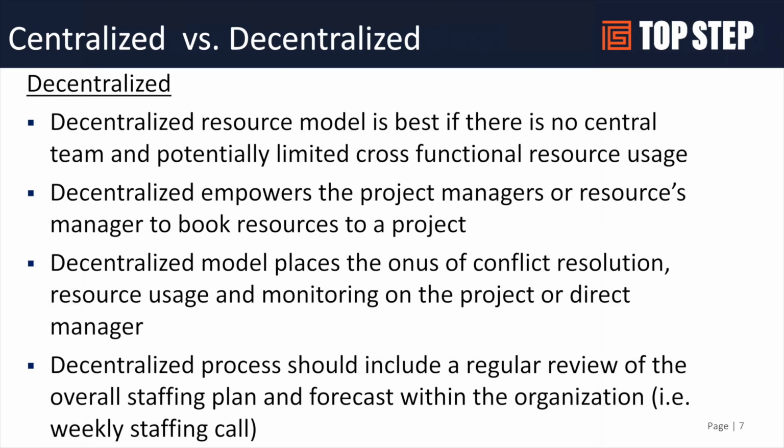As opposed to a decentralized staffing model, generally we see this in smaller organizations, but not necessarily. Basically, the folks responsible for the projects are also responsible for building out the project teams. A lot of times we see where the project managers are responsible for their own project staffing. So the project manager gets a project, they now have to go find staff available to them, and they're going and booking resources directly. There's no request and fulfillment of the resourcing.